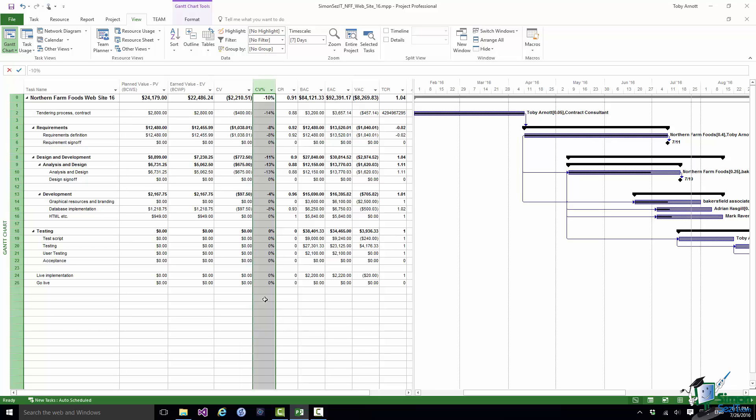If your CV percents are 10% and 8% and 11% and 13% they're all fairly significant amounts by which cost is running over budget. Whereas if they're minus 1%, minus half a percent and so on then that's much less of a concern.